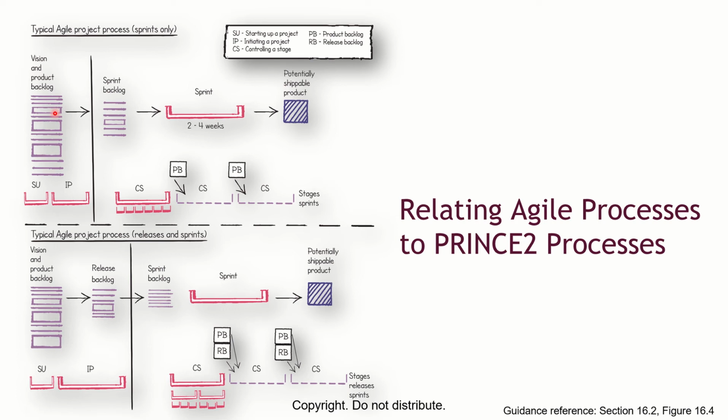When you pick what you can achieve, you also call that a sprint. For example, we want to build 20 high-rise and we now divided the work into monthly, what you can achieve on a monthly basis. So we can say for the first month, which is now the sprint, first sprint, what do we want to achieve? We want to do the foundation. And you know that foundation for a high rise building must be very deep. You have to dig down to provide a solid base for the 20 floors.